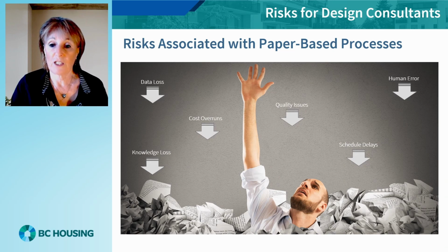One risk associated with the paper process is data and knowledge loss, as information is shared infrequently or not recorded at all. Working in silos causes disconnection, leading to quality issues, human errors, and increased costs. Remember, 98% of projects experience delays, with rework estimated to be responsible for 30% of time on site. You can see how resolving even a few of these issues would significantly impact budget and delivery schedules.